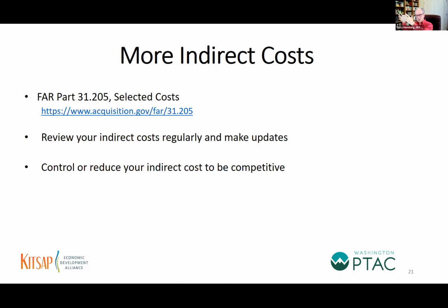Those are all costs that you want to include. Okay. And you're in a leased building, leasing one floor of a 5-story building. You've got that lease expense. That is allowable. That's an indirect cost that you want to list in your pool of expenses and figure out what your rate is, the daily rate or an annual percentage rate to put in your cost proposals.